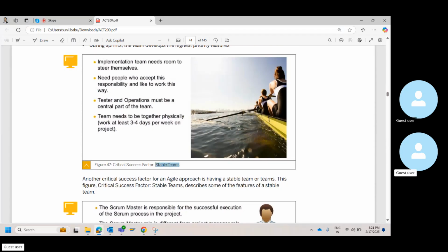Stable team. Yeah. So you cannot have someone who is going to take requirements, and if that person is not the person who does the configuration in the realize phase, you're going to fail. Okay. So what is more important is the person who gathers requirements at least should be doing the configuration on the first level, and then as he does the configuration, there can be one more shadow consultant who will do all the necessary testing and stuff, documentation.